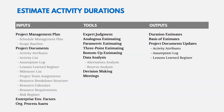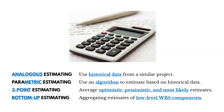You'll need expert judgment from those who've done similar work. The three main estimating techniques are: analogous estimating — using historical data from a similar project, like comparing to a previous project that cost a couple hundred thousand dollars; parametric estimating — using an algorithm to calculate cost or duration based on historical data (the word 'metric' helps remember this involves math); and three-point estimating — averaging optimistic, pessimistic, and most likely estimates.